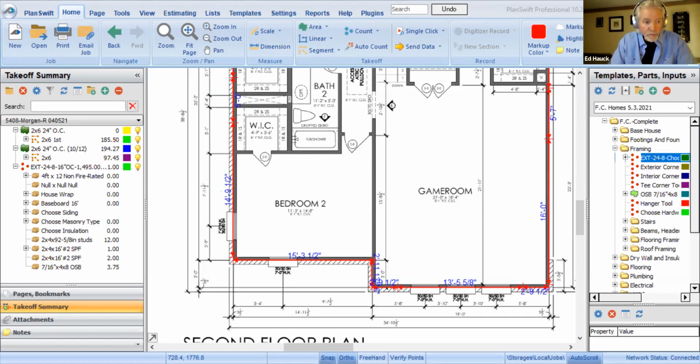So Dave, what we're finding out a lot is we haven't been managing our framers to this level in the last few years because lumber was reasonable. Now we need to pay attention to it. There's two things we're finding out. One is the superintendents really just hadn't paid attention to it during the build. Now we have to pay attention to it during the build. The supers have to be there. Somebody's got to be hands-on with the framer to describe what Dave was just talking about, from the superintendent to the framer. Because otherwise, they're just going to pull the material off.